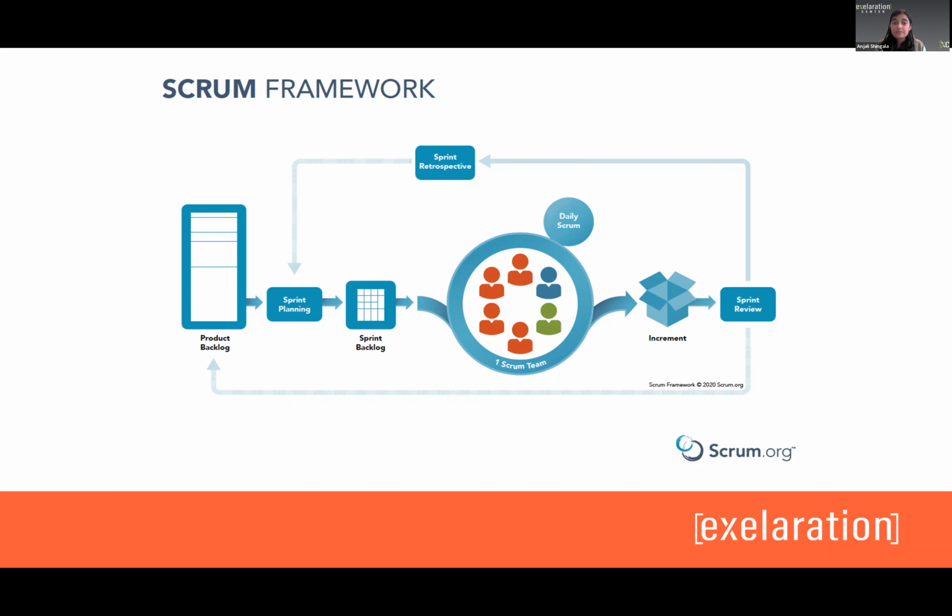But ultimately what that means is at the end of that 2-week time frame, you will be having a sprint review, where you're looking for feedback. That's where you're saying, here, stakeholders, this is what we've done in the last, for example, 2-week sprint. What do you guys think of it? Is this aligned with what your product vision was? I can develop you a circle button or a square button, but is this aligned to what you wanted at the end of the day?